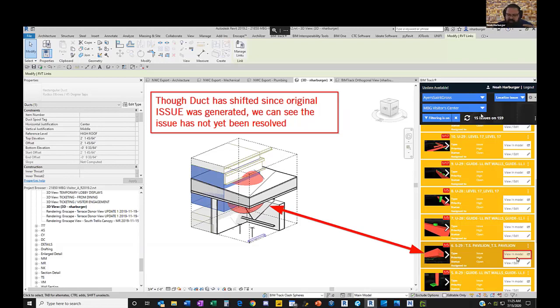So there's ways to do this. There's categories called confidentiality, where you can basically say, hey, I don't need everyone to see all 300 issues on the project. The mechanical engineers are only privy to the things that are given mechanical confidentiality. So their lists might only have 40 things on it. There are filtering abilities so you can narrow down your list to, let me just look at the critical items. Let me just look at the high priority items. Let me just look at the things related to the ducts and structures. You've got the ability to filter your list to hone in on the type of work you're doing.